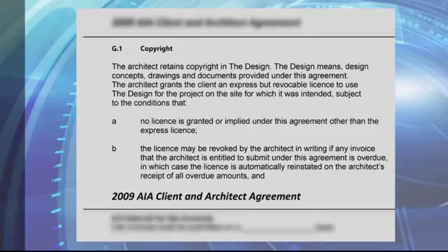Now, if the client is paying for the work, then it's fair that the client be able to use the work for which it was prepared and provided. So you should therefore provide a license agreement giving the client the right to use the design documents for the intended purpose. Make sure, however, that any licenses that you provide are non-exclusive licenses and subject to payment of fees due.